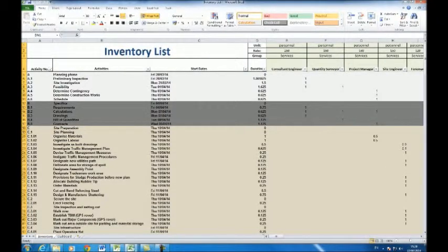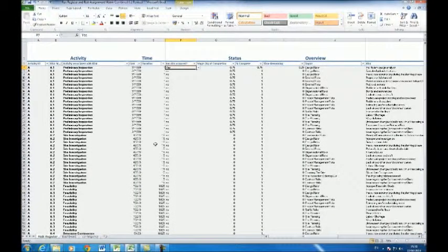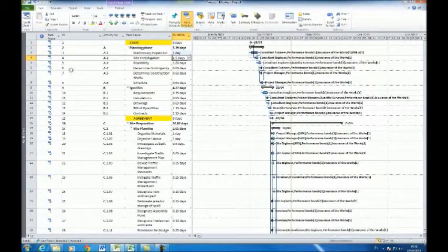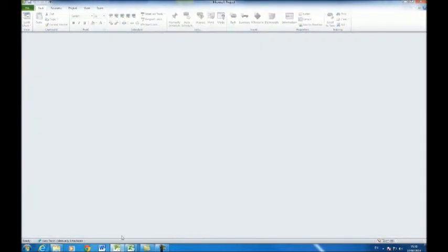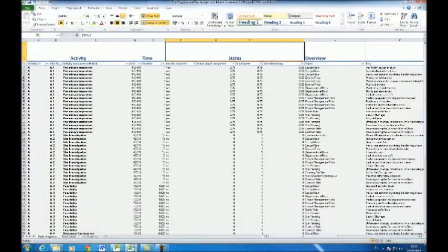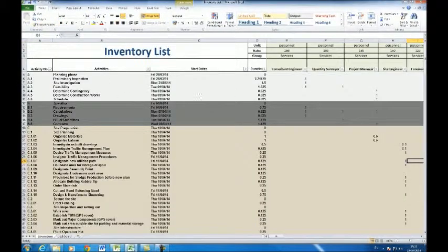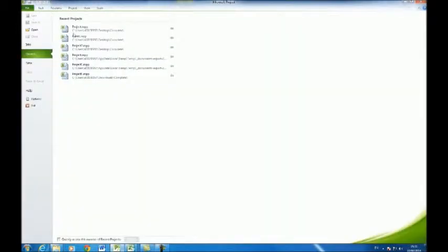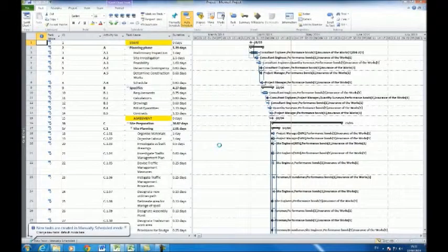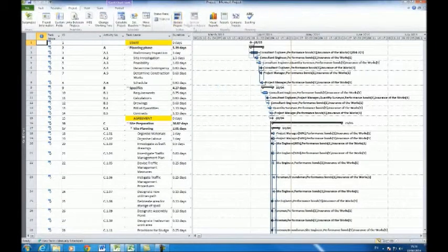When a risk actually occurs, as the project progresses, it will have impact on the cost of a project. To demonstrate this, change the status of the risk by navigating to the risk register, and select Yes in the relevant cell for the Has Risk Occurred column. Close MS Project as it is. Save all the other programs, and reopen the MS Project program, ensuring all links are enabled. Upon reopening of project, it can be seen that duration has been extended.